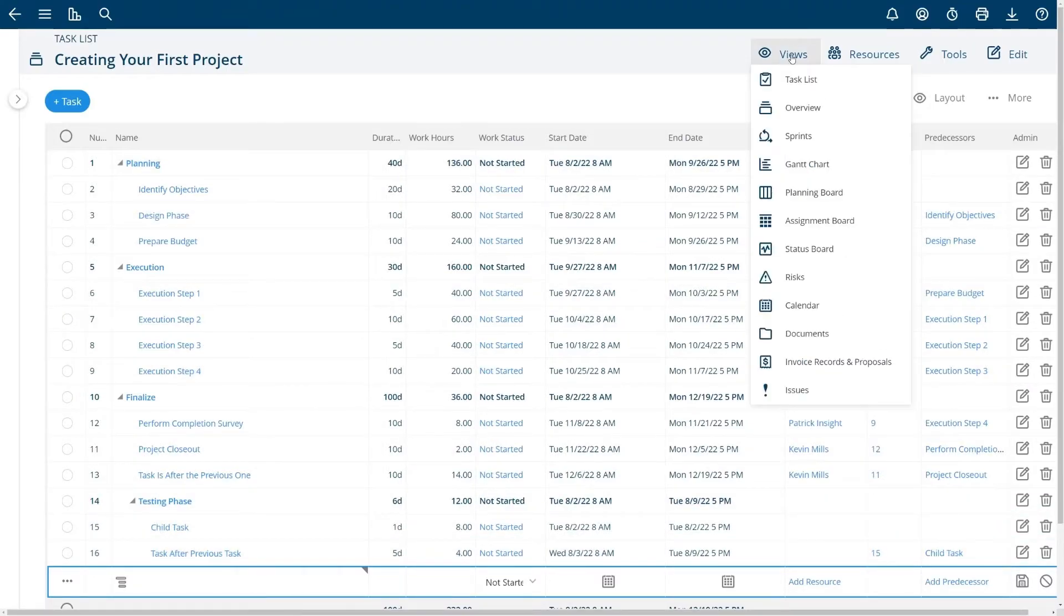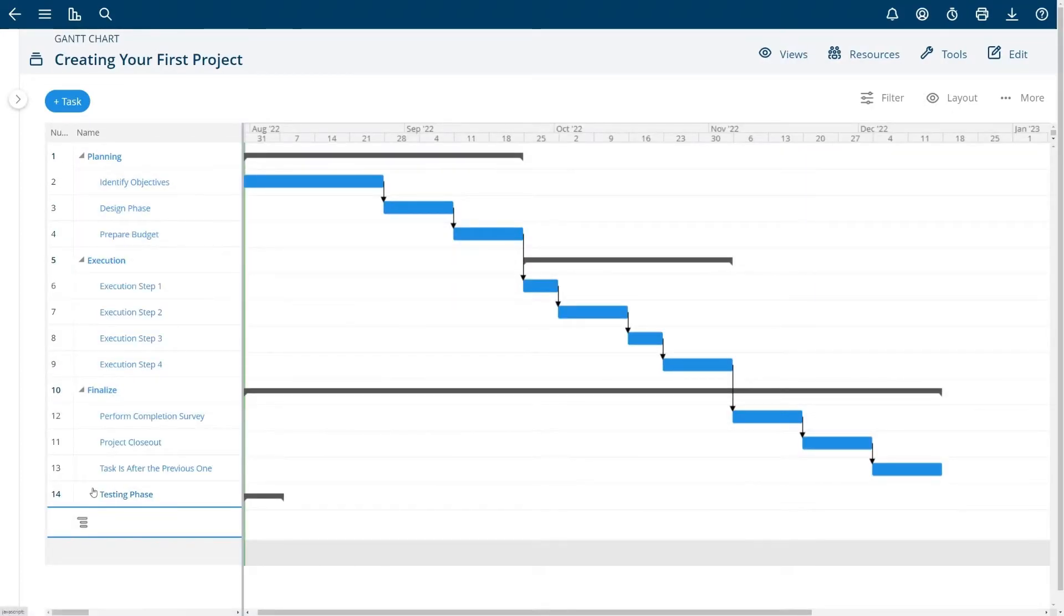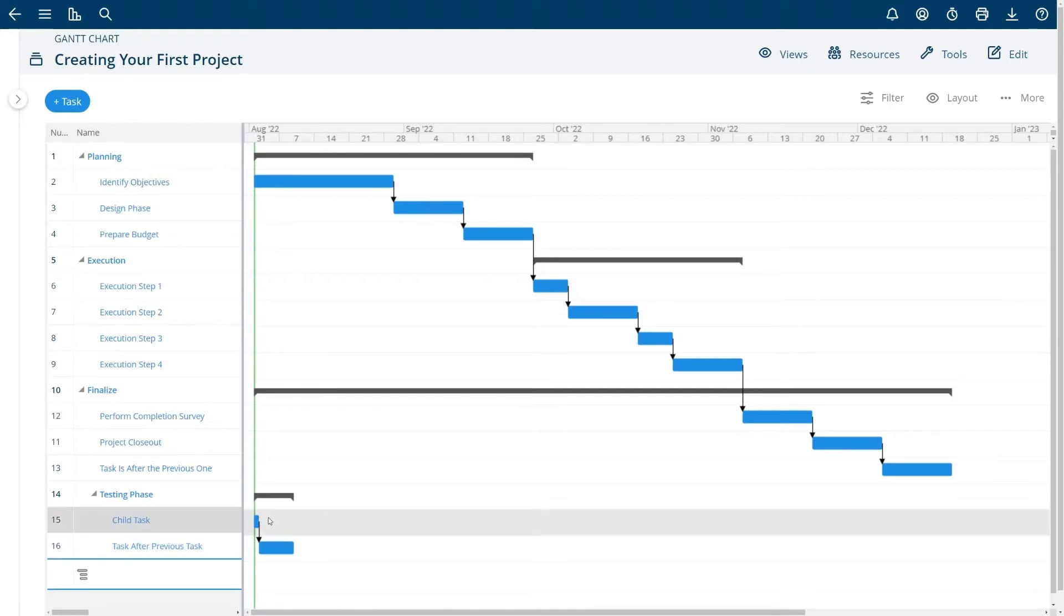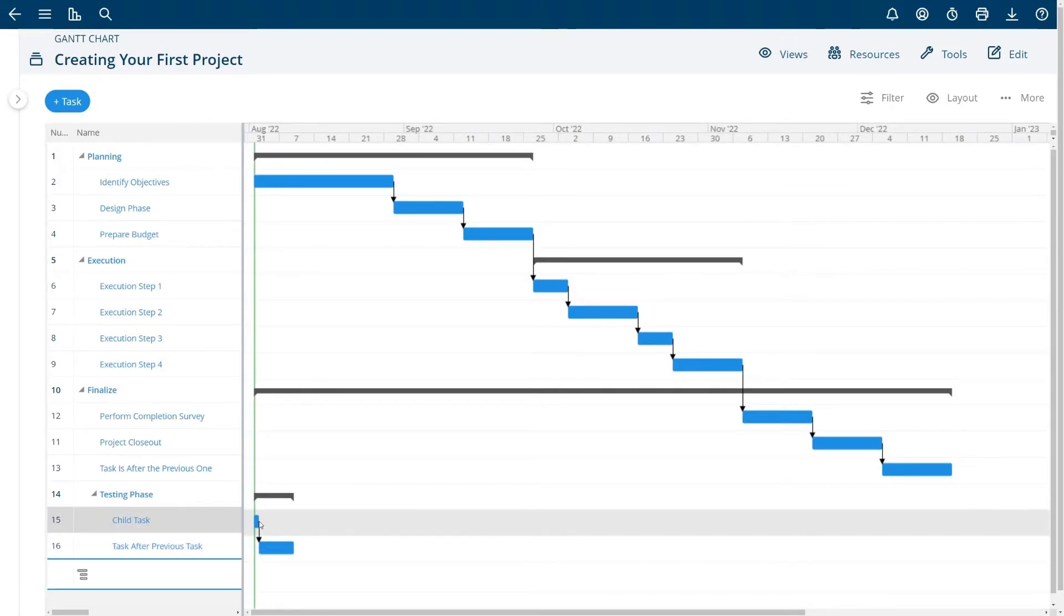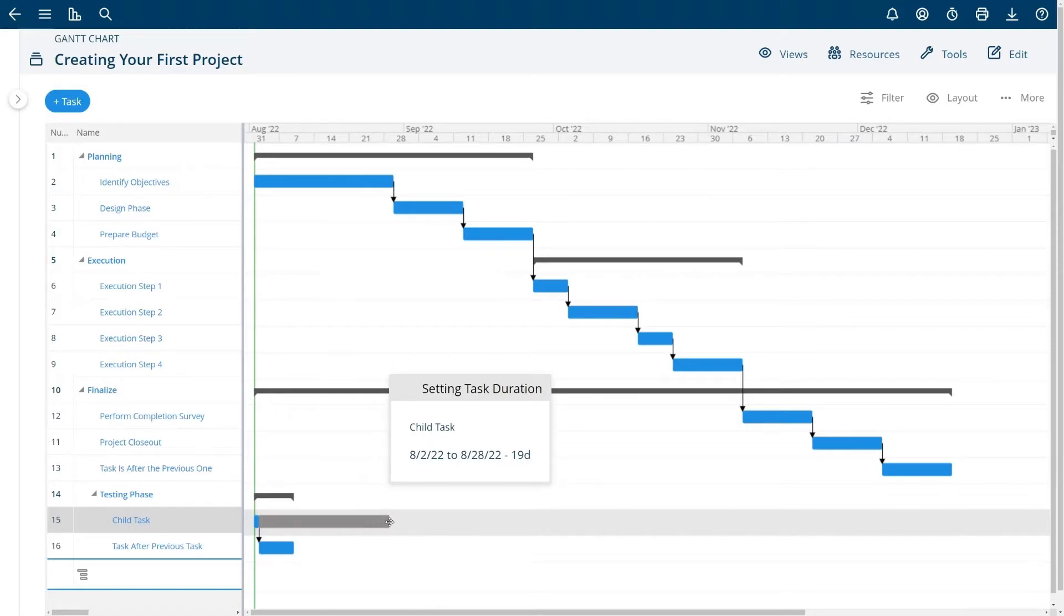You can very quickly see this in the Gantt chart. If I just navigate over to the Gantt chart you can see if I expand that testing phase I have these two tasks here. This task is a successor. If I move this task into the future to another date, in this case I'm actually making it a longer task.